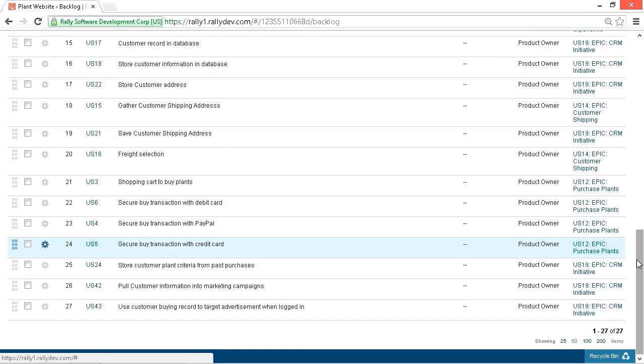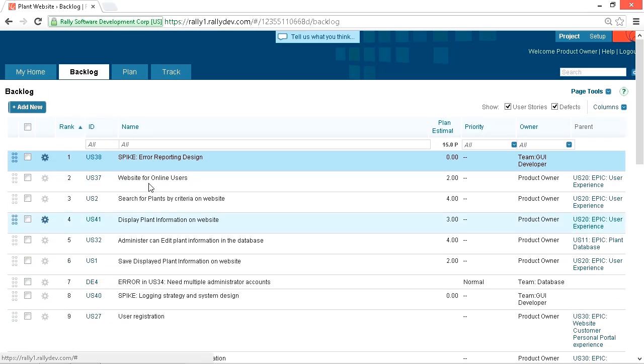In this way, the current sprint is always going to be having the features that are the highest priority to the customer. Now, any stakeholder can view this product backlog to see what features will be implemented next and where the features important to them, maybe down here, are, where they appear in the product backlog. Now, this provides transparency for the stakeholders on what will be included in the upcoming sprints.